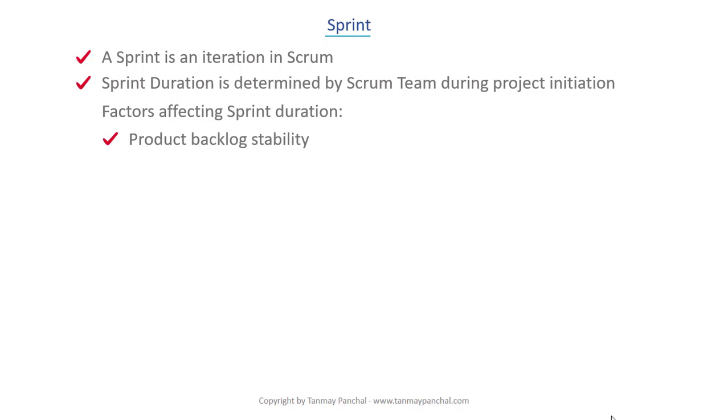Therefore, if many changes are expected, a shorter sprint duration will be best. However, if the product backlog is relatively stable, a longer sprint duration will be appropriate. Overhead: there are overhead costs associated with each sprint.